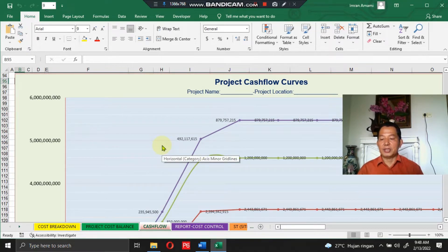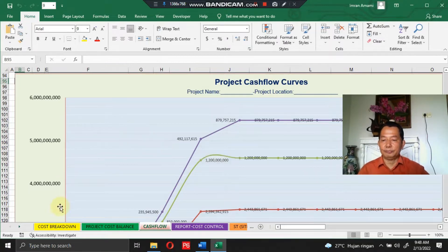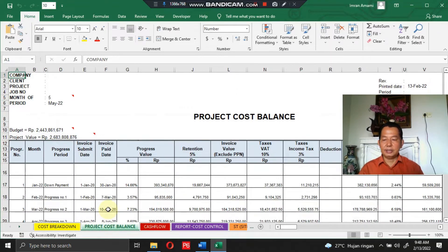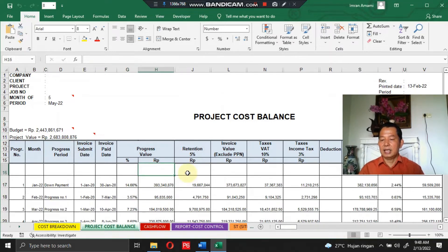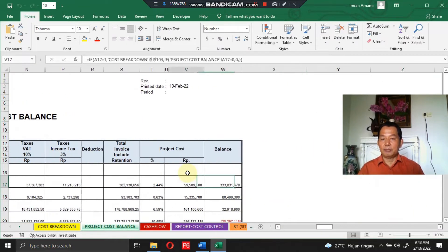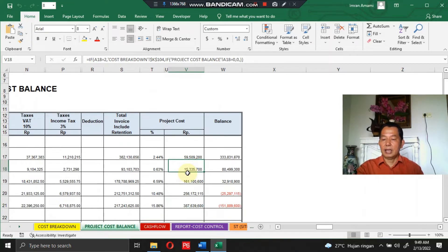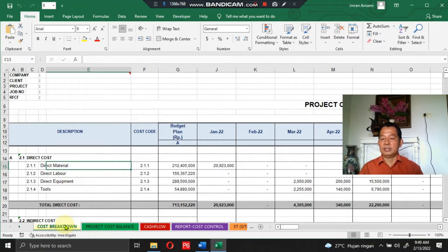The project cash flow curve interprets and visualizes the cash flow into a curve. In the project cost balance section, you will see the comparison between paid progress billing and the project cost incurred during the project, represented in total and in percent, along with the balance.